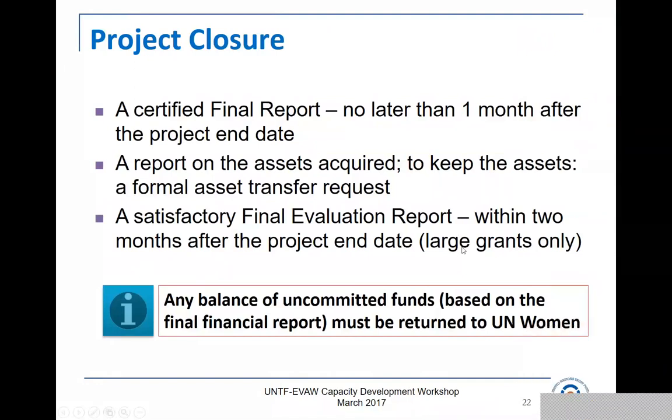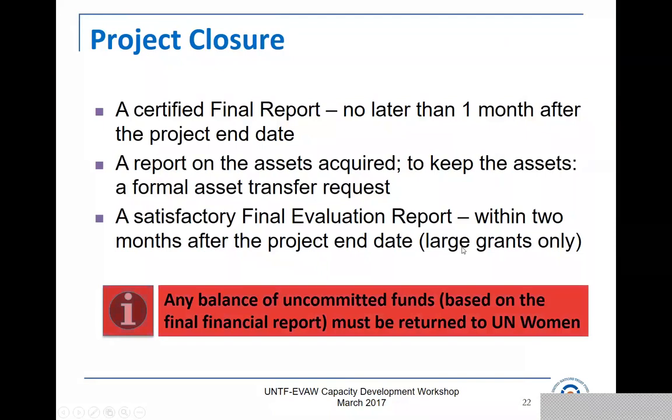So that's right at the end of the project. And then when we look at your financial report, we will ask for any money that's not been spent to be returned to us. And we don't give no cost extensions, so we won't be able to extend the project.